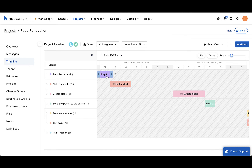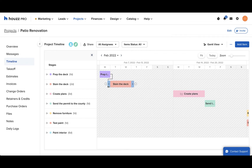You can create your dependencies in the Gantt view by dragging the connector arrow from one item to another.